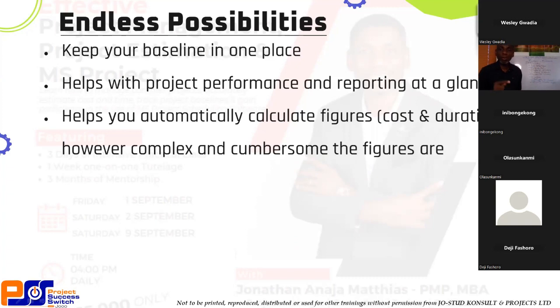You may need to wait for maybe 28 days, right? That 28 days, how do you account for it manually if you have several floors? But MS Project can help you calculate it using what we call lead and lag. You can write that down so that in the course of this class, when I start explaining it, it will sink back in your head. Lag, L-A-G, lead, L-E-A-D.